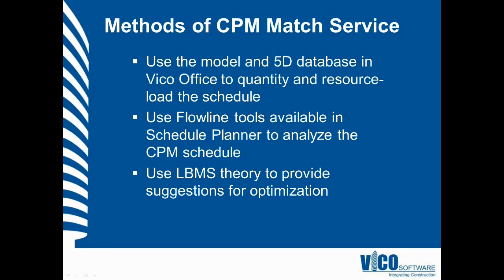We can then use the tools available in the Flowline interface to analyze the representation of the CPM schedule in Flowline, identify discontinuities of work, unrealistic resource requirements, let's say areas of no work or bottlenecks in the schedule, all of the typical issues that you look to mitigate by optimizing your schedule using the Flowline method.